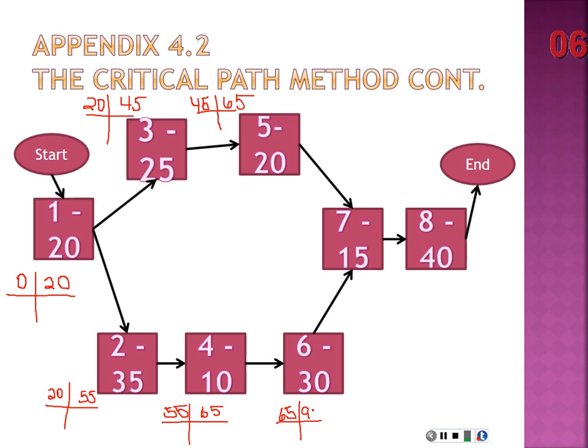Okay. All right. Andrew, you get the only kind of tricky piece here. Aren't you happy you got that lucky? So 2 arrows coming in. So do I take on the forwards pass, am I taking the earliest or the latest of those 2? The earliest. Okay. Everybody agree? No. It's the latest. Okay. Kidding. You're just checking to see if I knew, right?